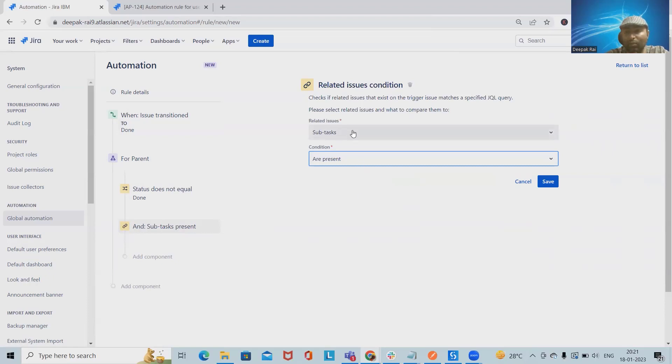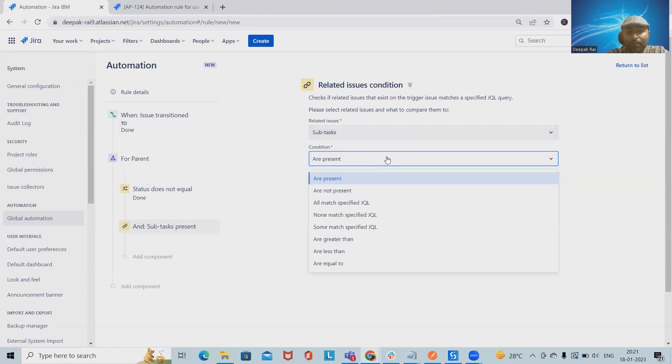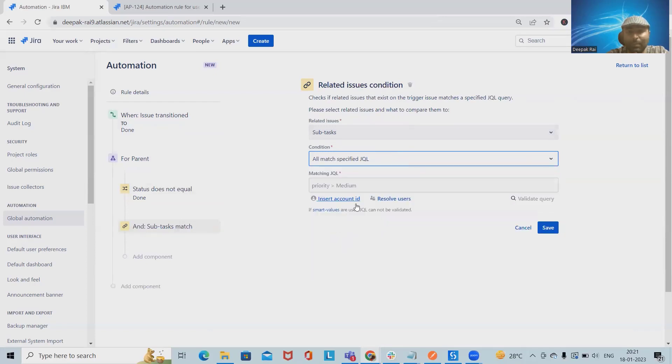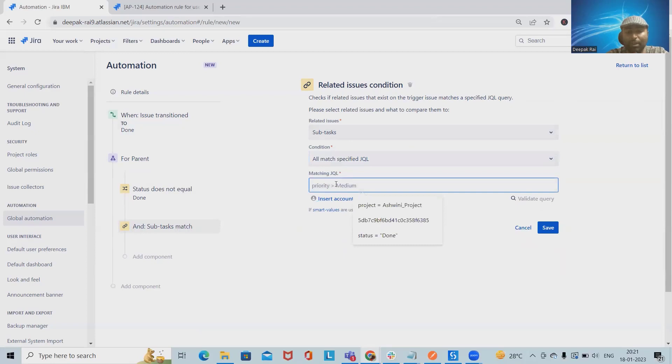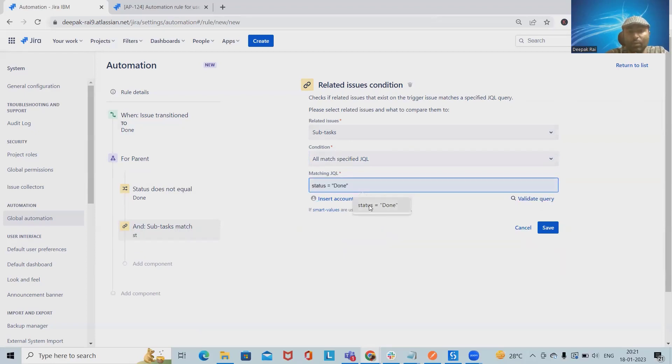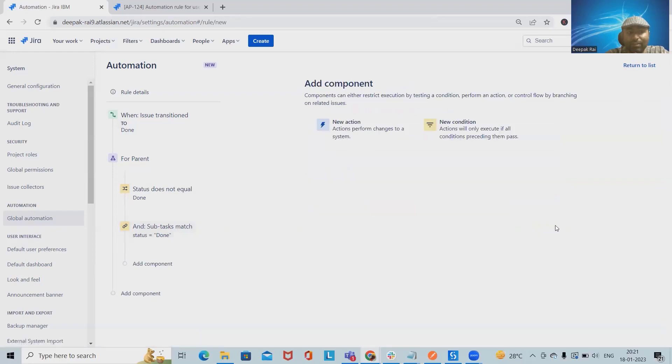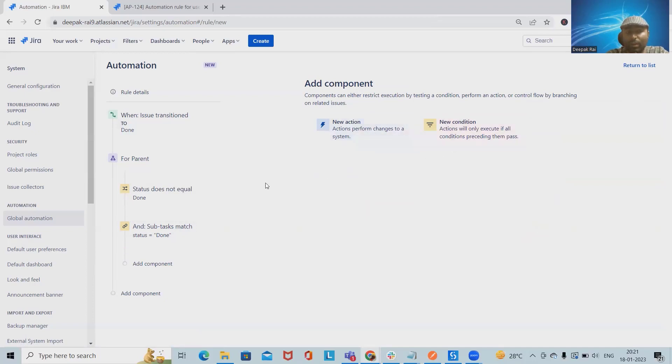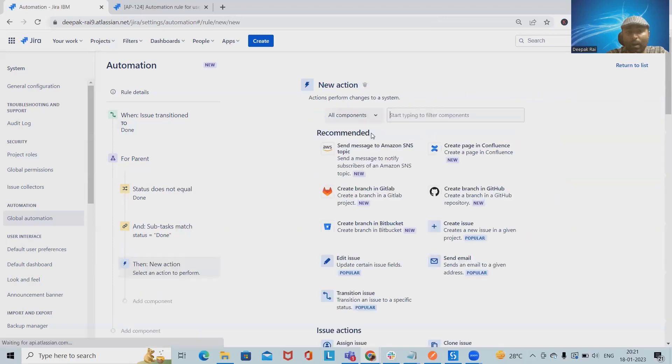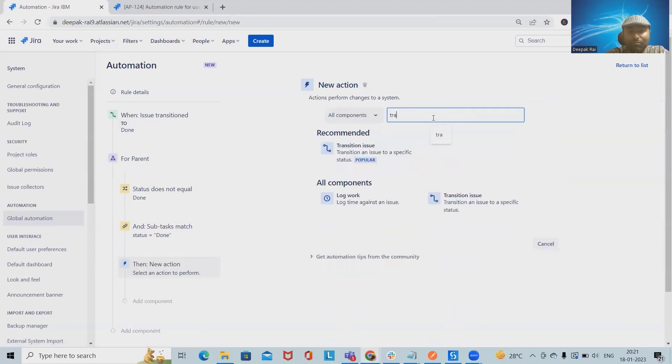I will select all match specified JQL, and from here just write the JQL query status equal to done. After that I will save this. Now we want another transition, so here again I will add one new action as transitions.